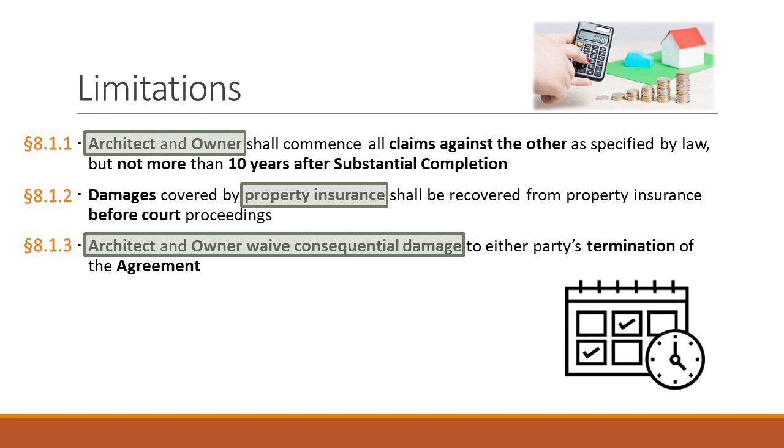So the cost to fix the pressurized system, that's directly related to the work in the project. The cost of fixing the floor, the cost of fixing the damaged bar, those were all costs directly related to the project. Consequential damages as a result of that is the lost revenue for the business, so business interruption.